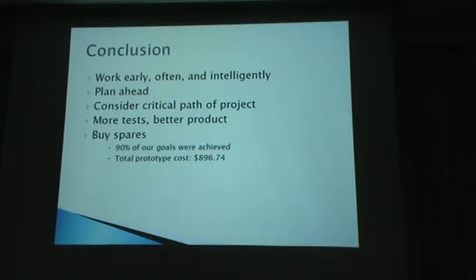If we planned ahead, we would manage the time better, and the product would be better than it is now. And again, on the critical path of the project, we were held up at certain points where we ordered new components and were waiting for them to arrive. We could have managed the time better. Also, if we could have started testing the components earlier, like in phase 1, when we had components we decided we didn't want to use, we would have gotten more time to work on everything else. And also buy spares.